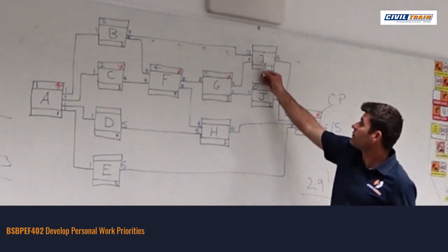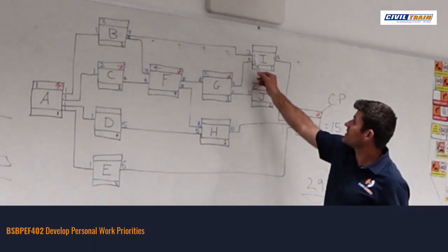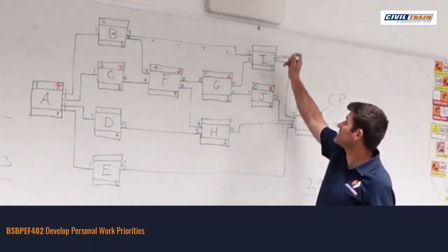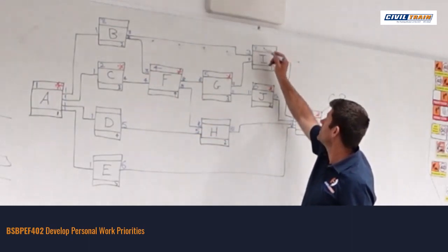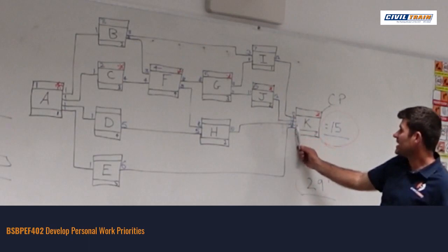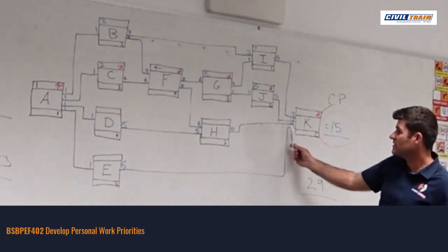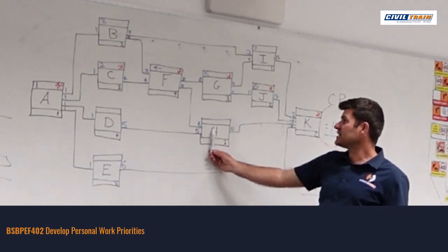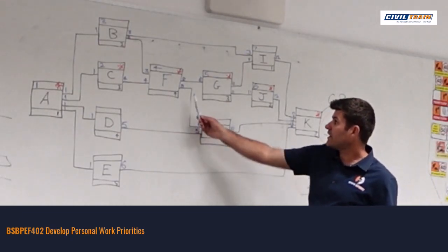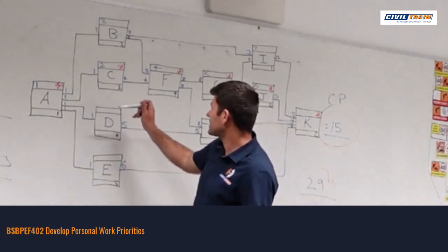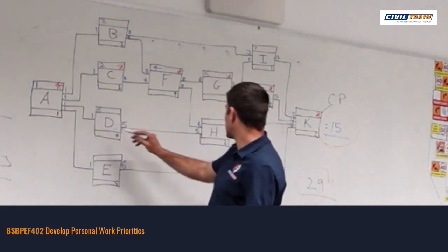I check. I want to make that 7. All the other connections coming out are already numbered. So I can make that 7. I want to make K 8. I can't. Follow the next biggest number back out, which is 10. I want to make H number 8. Anything stopping H? Not F. Come back. D and A. So make that 8. Then I can make that 9.